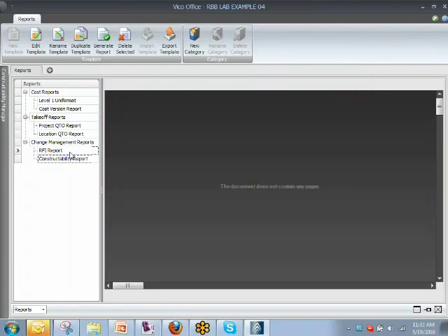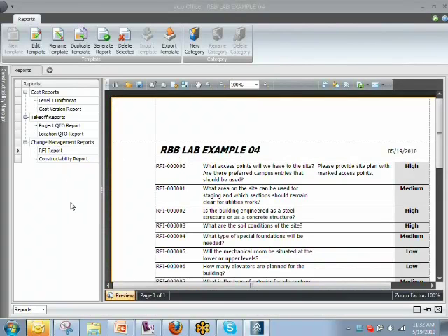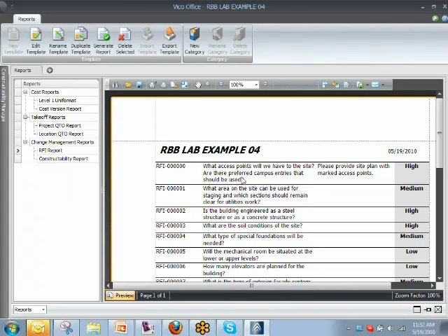Just to show this as well, I created a quick report of the RFIs. So all that information is exposed for the report editor. So generating an RFI report with the currently pending issues is possible too. So if you want, you can generate the documents needed in advance of the meeting, distribute that by email, and then go through the issues one by one during the meeting, interacting with the model.